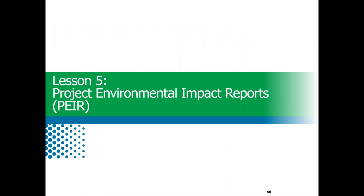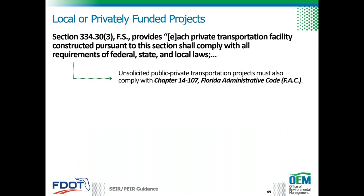In Lesson 5, we'll discuss projects that are state funded in which FDOT is not the lead agency, and where a PEER may be prepared. Local and privately funded projects must comply with all the requirements of federal, state, and local laws as stipulated in Section 334.33 of the Florida Statutes. These projects must comply with all applicable requirements including federal, state, and local laws; state, regional, and local comprehensive plans; department rules, policies, procedures, and standards for transportation facilities; and any other conditions the department determines to be in the public's best interest.